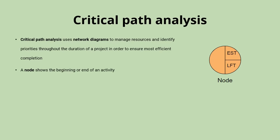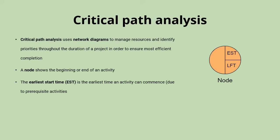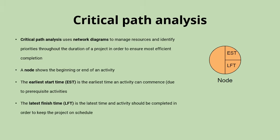In the top right of the node we put the EST, which stands for Earliest Start Time — that's the earliest time an activity can begin because of activities which must have been finished before it can start. In the bottom right of the node we put the LFT, which stands for Latest Finish Time — that's the latest time an activity should be completed if we're going to keep the whole project on schedule.